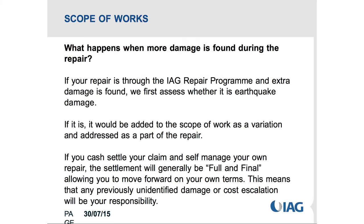In our process, if you're going through a managed repair, you also have a rebuild solution manager from Hawkins who will help you through the process. If the repair starts and more damage is found, we'll look at it to make sure it is earthquake damage, and if it is, it will be added to the scope of work as a variation. This happened more in the early days of insurer programs, but now we have critter cams - cameras that go down and look at foundations - and we open up walls if needed.